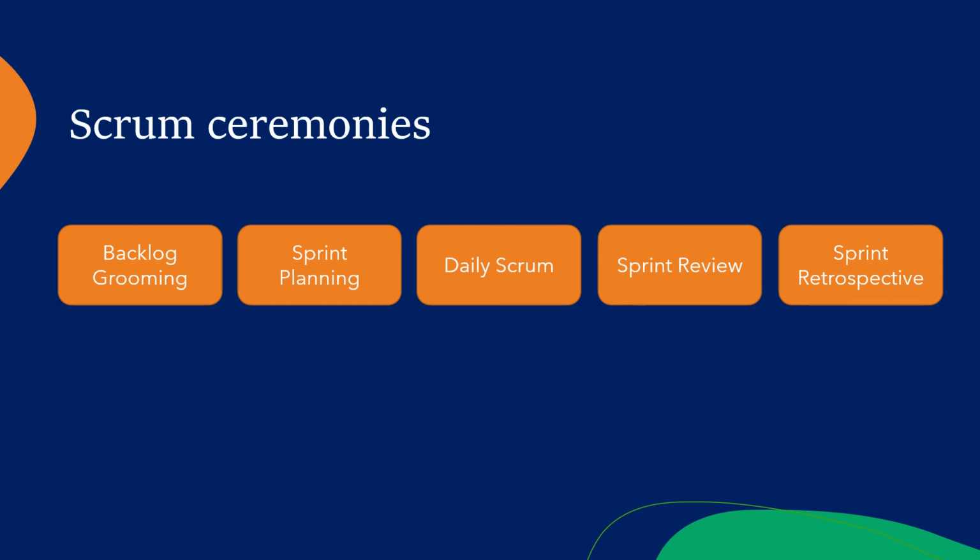The scrum team shows what they have accomplished during the sprint review meeting. The sprint retrospective is usually done as the last step of a sprint. The entire team should participate for at least an hour to gather data and insights from the team, discuss, and make improvement plans.